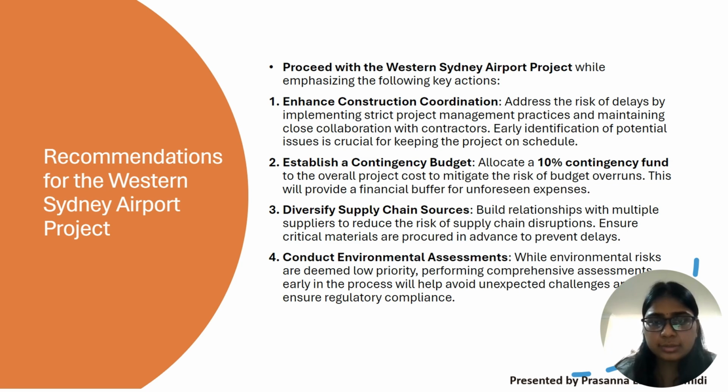mitigate the risk of budget overruns, use the fund as a financial buffer for unforeseen expenses and emergencies, and regularly review and adjust the budgets to maintain financial controls.